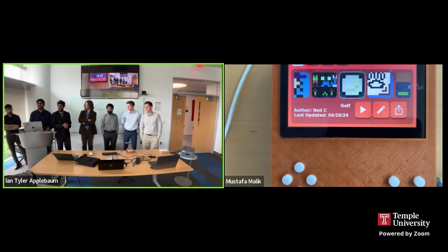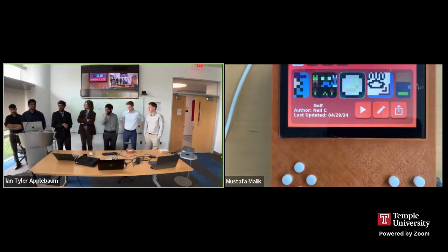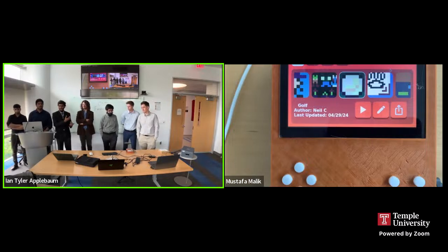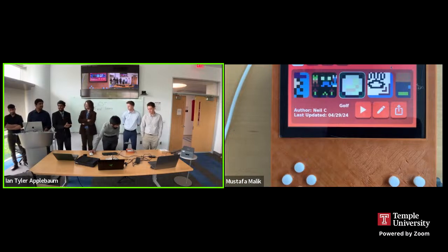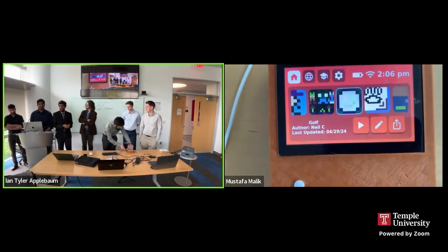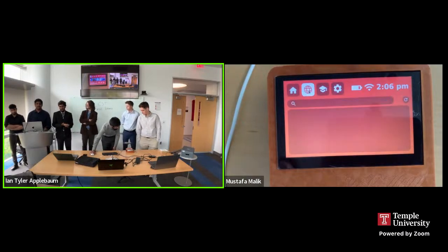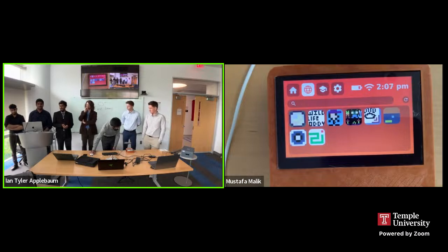The team building was excellent in software design. I think one of the most notable differences was when we migrated to Jira, one of the things we noticed was you can't assign multiple people to one ticket. It was one person per ticket, so it's one person's sphere of responsibility per ticket. There was some adjustment to that because we were really used to doing multiple people on one ticket in software design, but that worked because we were really good team members. So that really carried over into Capstone, and I think we were really prepared.